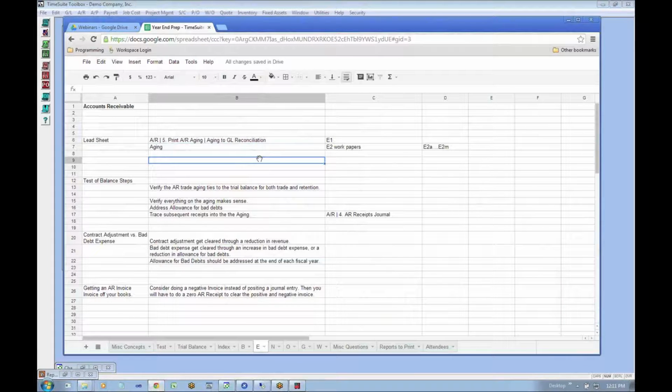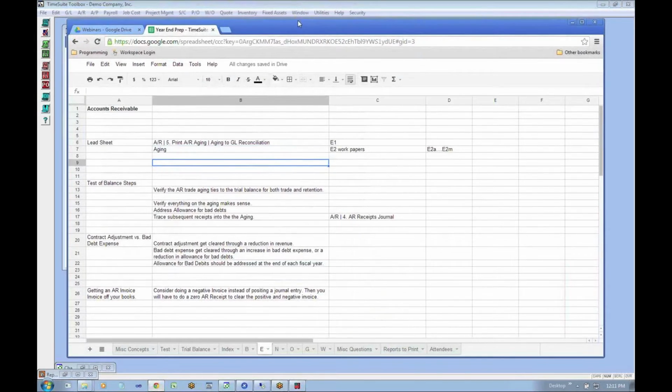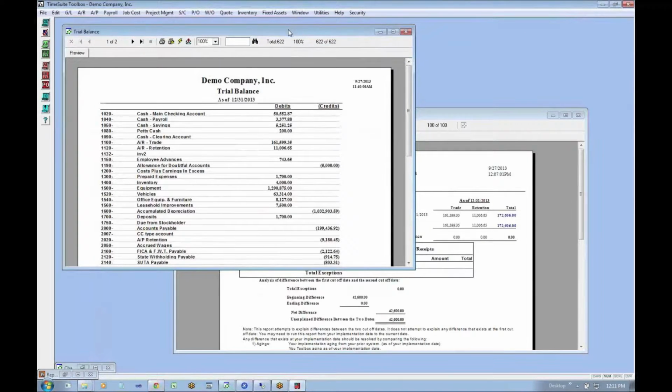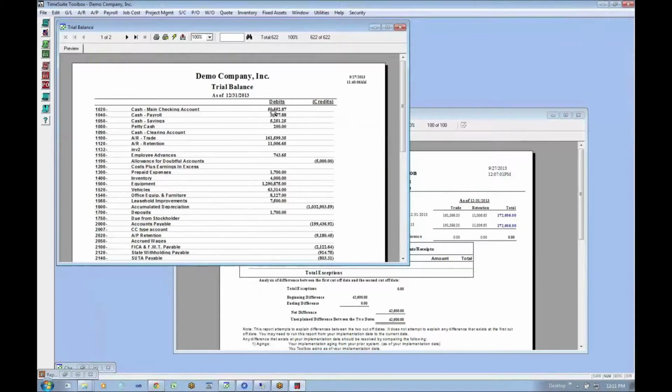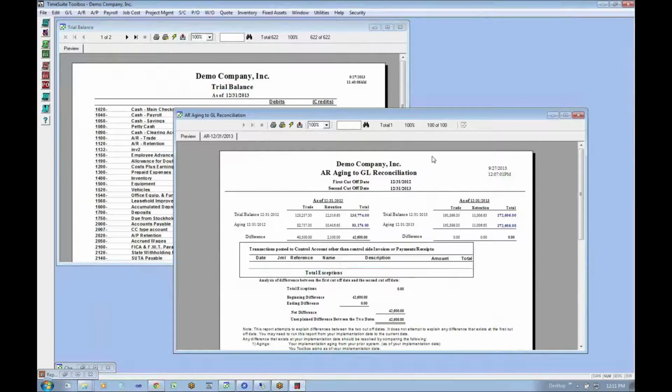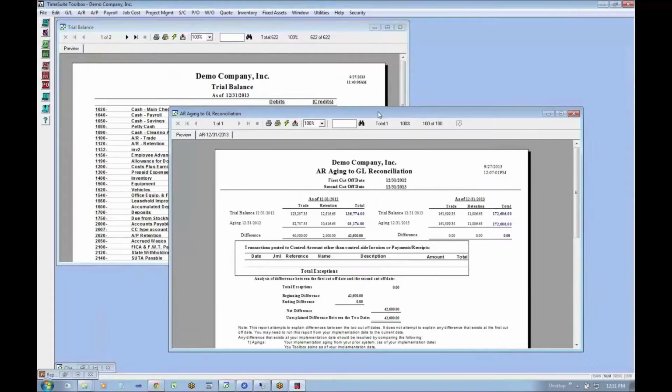Right. So what they're doing is trying to put your internal books on a taxing method. A completed contract method is typically seen on the tax side. On the residential contractors, sometimes their internal books will be on a completed contract method, but even a lot of those now will be percentage completion, unless they just do development and own all their projects. Then it would make sense to do things on a completed contract basis.